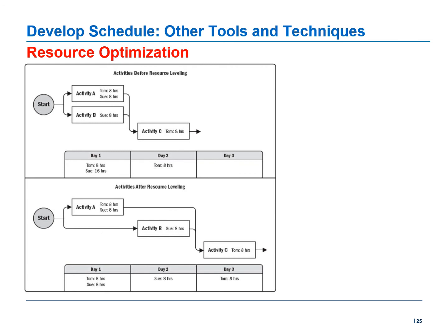Resource leveling can be used when the shared or critically required resources are available only at a certain time or in limited quantities or are over allocated, such as when a resource has been assigned to 2 or more activities during the same time period, or there is a need to keep resource usage at a constant level. Resource leveling can often cause the original critical path to change.